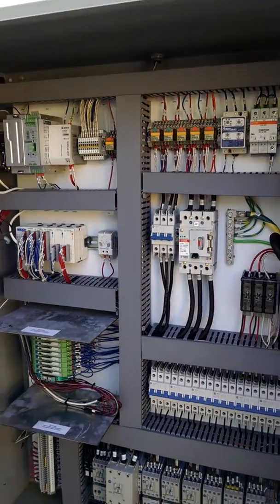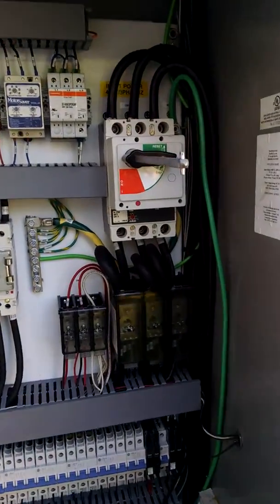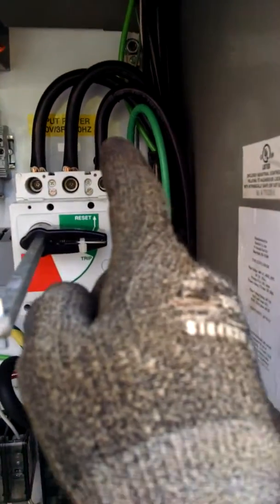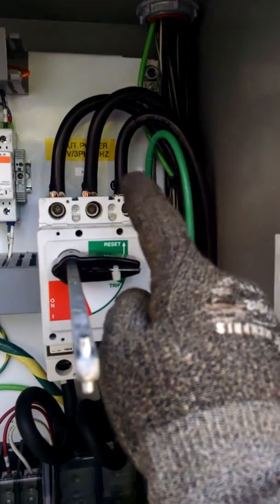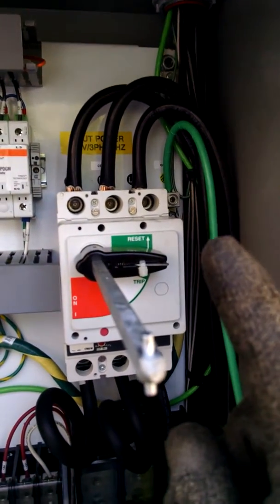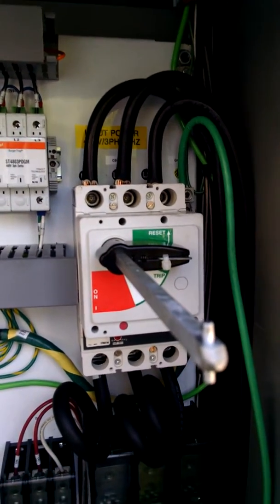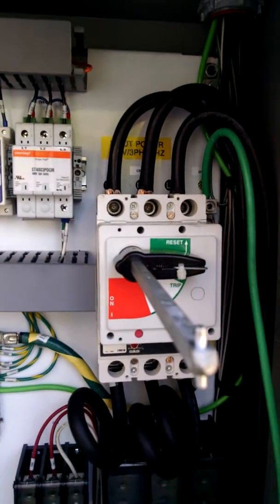What you want to do is check out the control panel. This is all with the power off. First you want to verify that all the wires connected by the local electrician follow the wiring diagram. Normally you're going to have power wires, a ground, and a neutral depending on the system — just verify that it's all set up as per design.